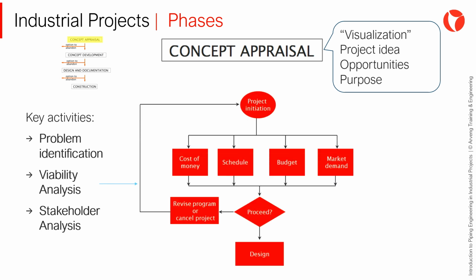Feasibility analysis allows you to estimate the cost-benefit before deciding to invest in a specific region, area, or sector. Multiple variables are analyzed for this purpose, such as market demand, construction cost, interest rates, and estimated schedule for the project. Next phases continue if and only if this analysis is favorable.